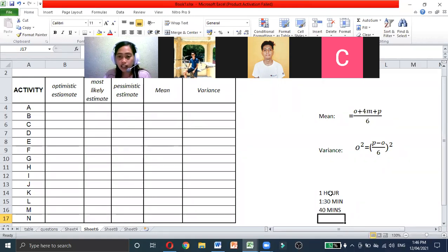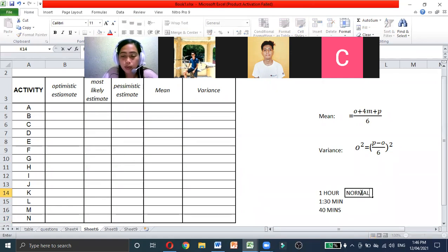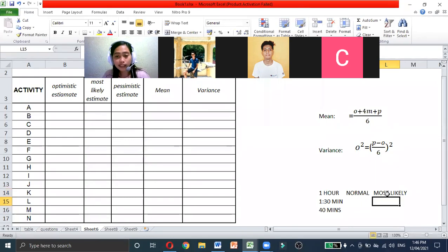His normal time of 1 hour is termed the most likely estimate. And 1 hour and 30 minutes is his pessimistic estimate.